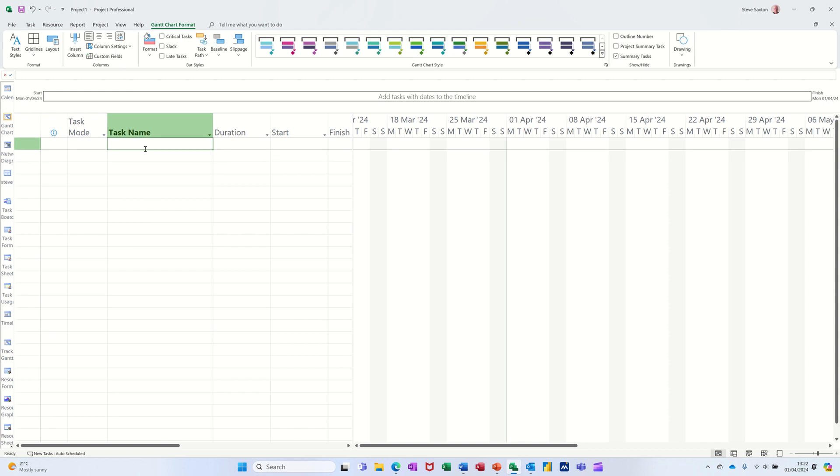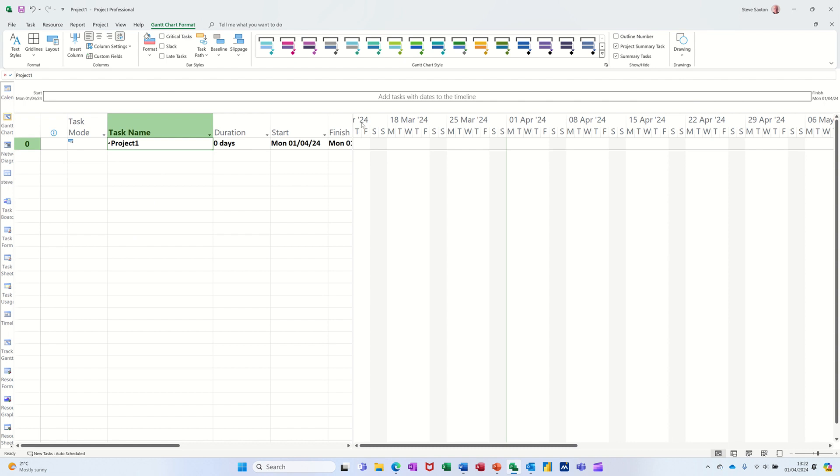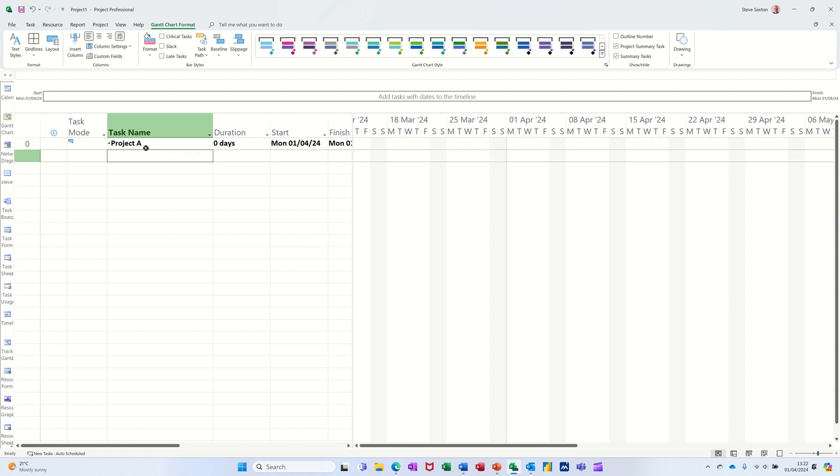So first of all, project summary tasks. To get that you need to go to the Gantt chart format tab and activate it over on the right here by ticking this little checkbox project summary task and it automatically drops it in there. You can change the name so I'll just call that Project A. That's the summary task. I've got no duration there because this is picking it up from underneath and there's nothing there at the moment.